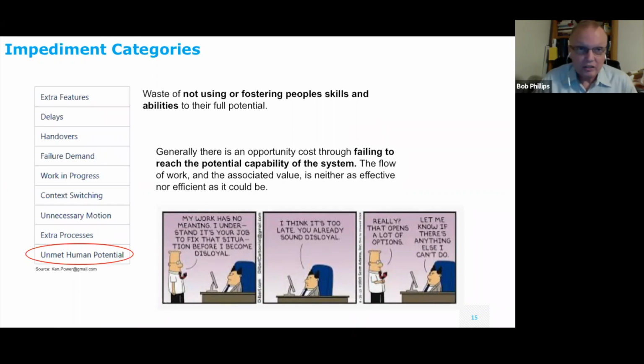I'll touch on it, but we can't go into too much detail because I still have to talk about the story cubes. But the extra features, this is really important, all right? And you're correct that that's also known as scope creep. That's why if you're following a waterfall project, they have an almost impossible change control process where you have to go through an act of God to get a change in the system, because waterfall recognizes that change will cost more time.